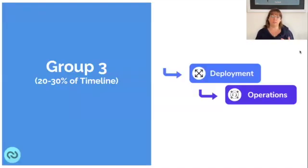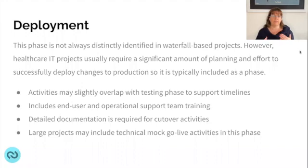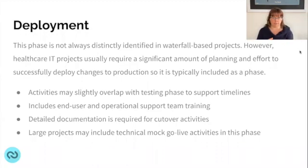Group three covers the remainder of the timeline, including deployment — which is typically added for healthcare IT but wasn't in the original model — and operations, which is your support and maintenance. The deployment phase is included because of the significant impact on users, requiring planning and effort. Some planning activities and training initiatives can begin while still in the final QA testing phase, though full deployment cannot occur until testing is complete and all critical defects are resolved.